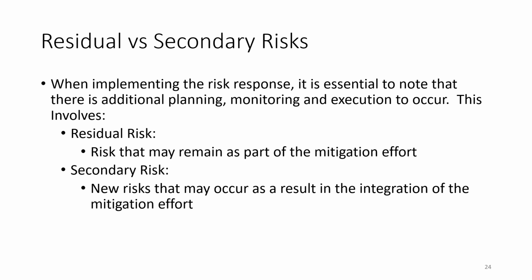This involves residual risk, risk that may remain as part of the mitigation effort. For example, you modify the setting of a wireless access point to eliminate interference. The solution may greatly reduce but may not eliminate the wireless interference in its entirety.